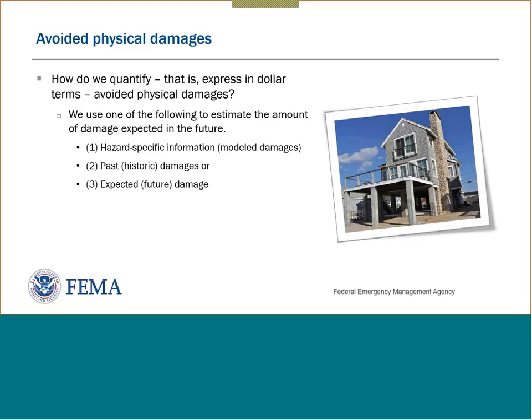You can base your benefit cost analysis on past damages, or what the tool will say is historic damages. And here you would have to have documentation for the damages, or what's called expected or future damages. And this is where you have a subject matter expert looking into the future and saying, based on scenario A and B, under scenario A, this is what we would project the damages to look like, and scenario B, this is what we would project damages to look like. And the tool uses that information, again, to calculate benefits. Next, please.